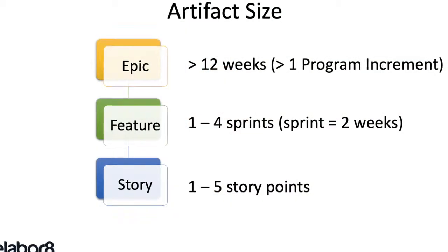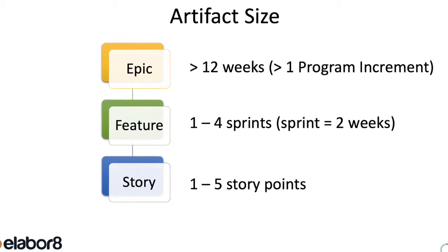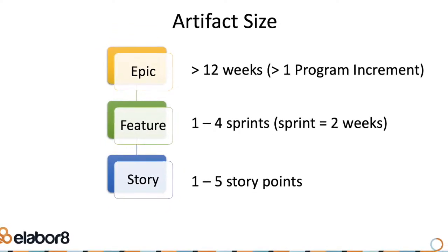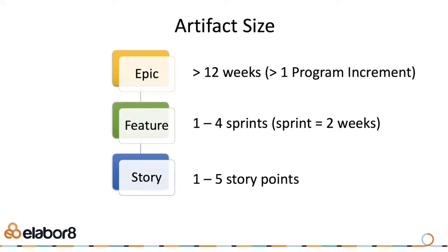Then we come down to stories. People tend to be a lot more comfortable with that. Everyone knows that stories need to be delivered within a sprint, so typically they're sized somewhere between 1 and 5 points, okay? So that's the size dimension.